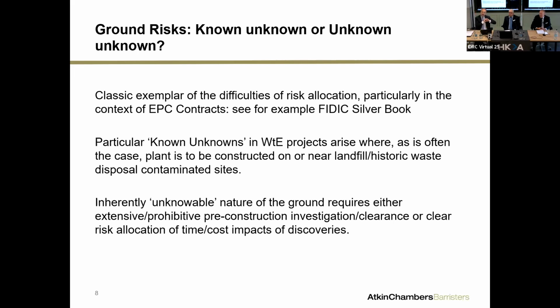Or do you say, right, everything goes over to the contractor, sort of FIDIC Silverbook style, which of course we know doesn't always work. It's always going to be that risk, which is going to have time and cost impacts for all parties, and come at it from the perspective of the likes of me, the potential for dispute.